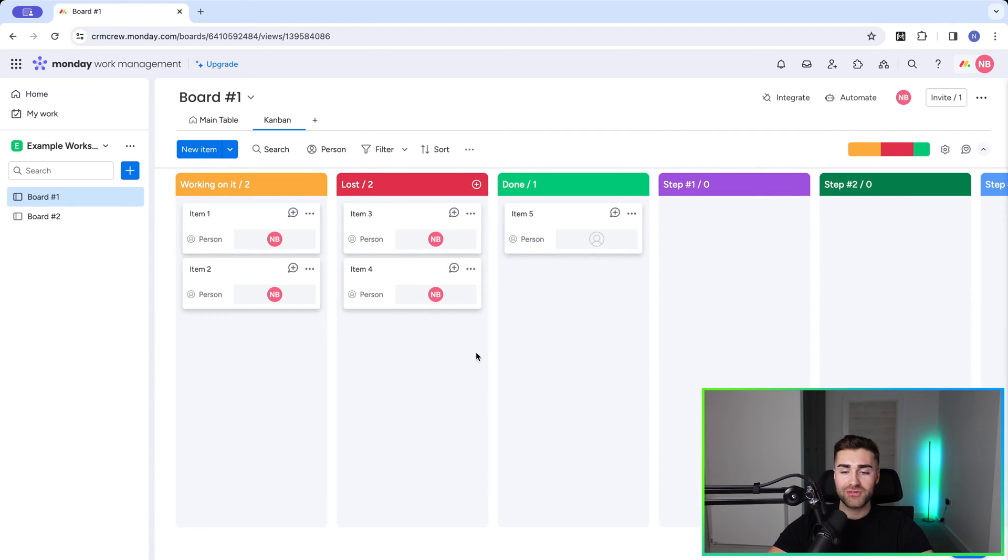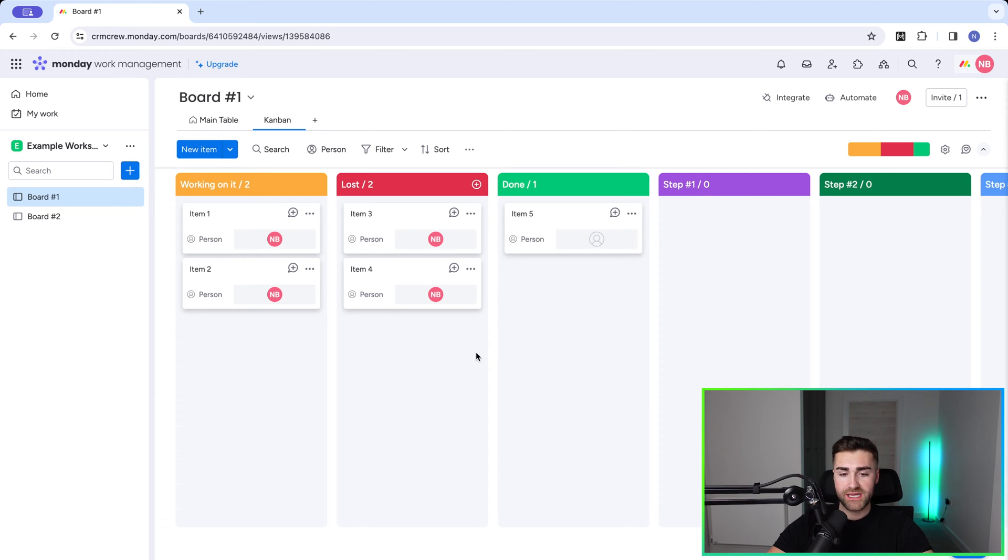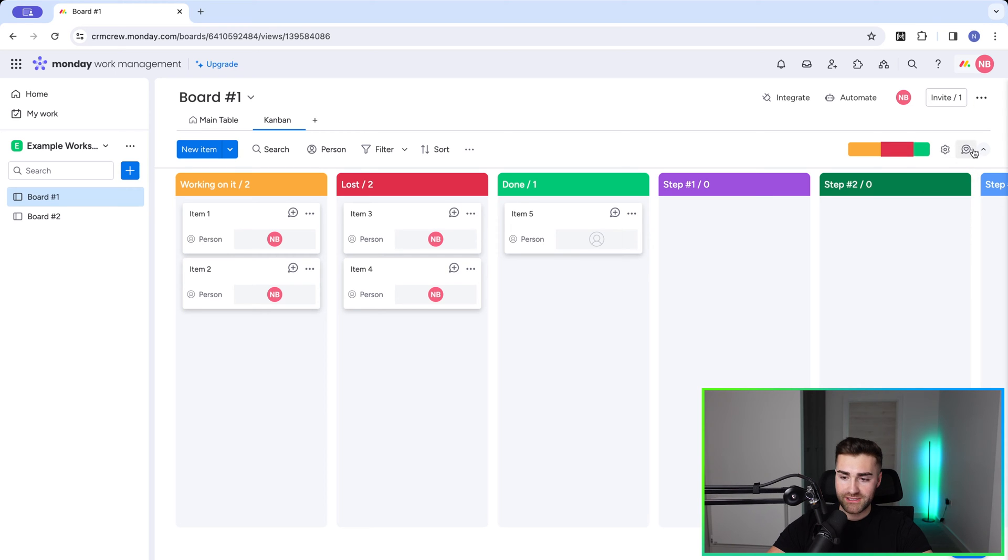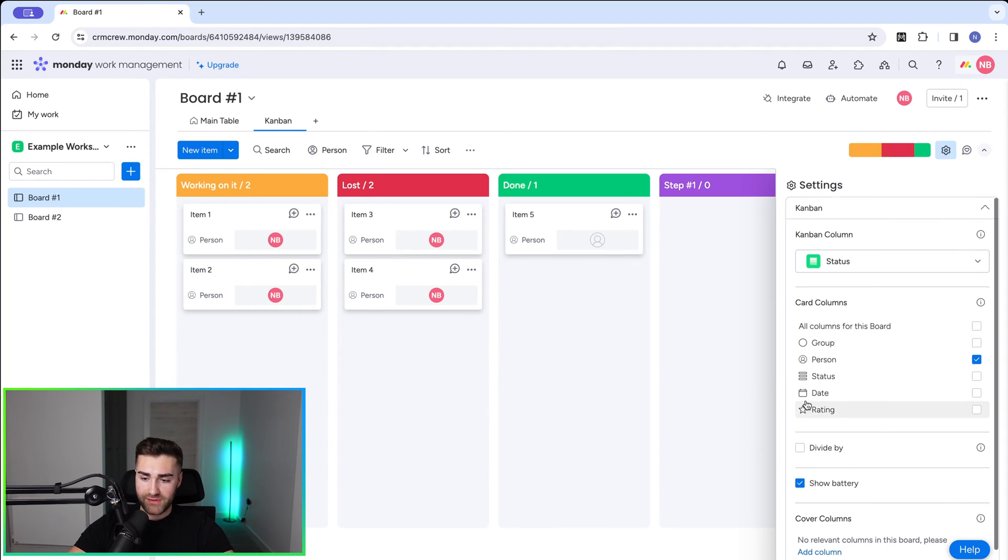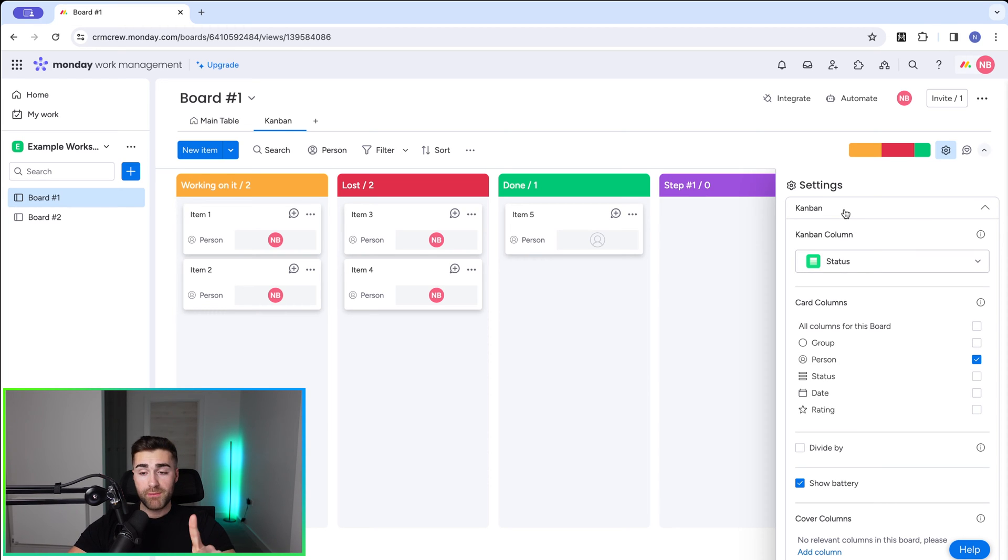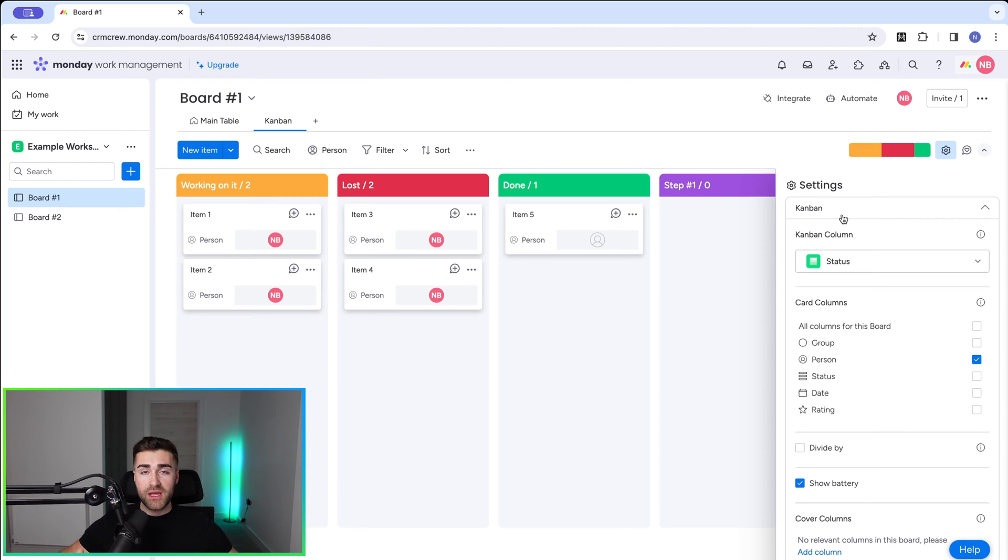Now there are lots of changes that we probably want to make to our Kanban view before we go ahead and start using it. So let me walk you through those. If we go to the cog option on the far right hand side here, select the settings. We've got a number of different options available to us. So number one is we need to define the status column that dictates our Kanban view.